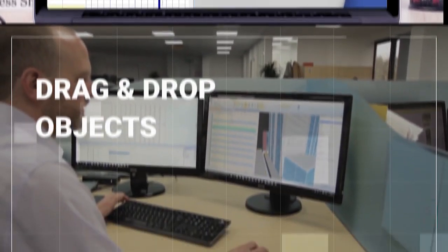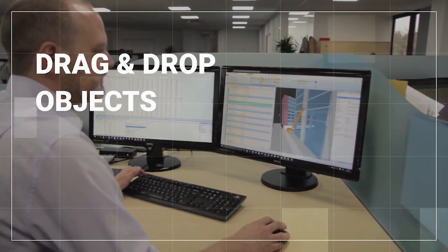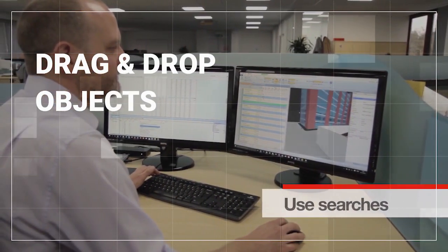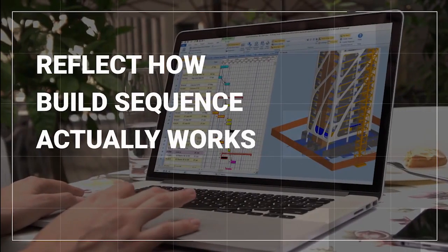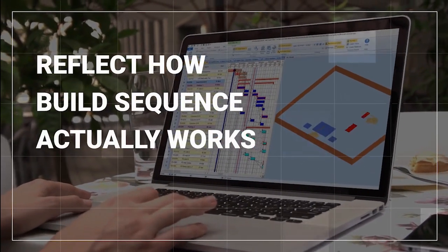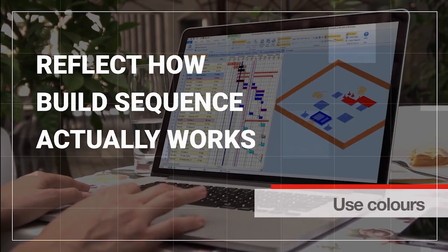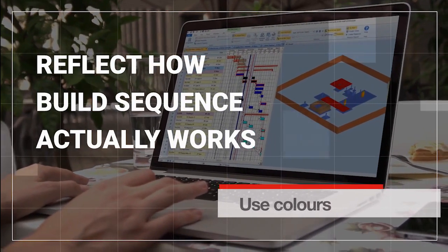You can just drag and drop objects between the 3D view and tasks and use searches to find groups of similar items. You can split models down to better reflect how the build sequence actually works and define colors to be used to show different stages.